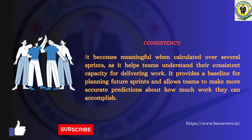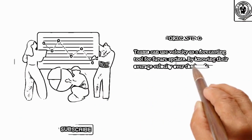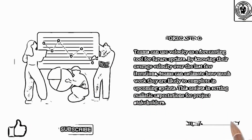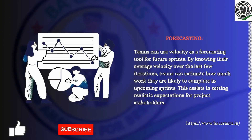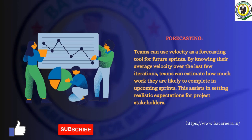Forecasting: Teams can use Velocity as a forecasting tool for future sprints. By knowing their average velocity over the last few iterations, teams can estimate how much work they are likely to complete in upcoming sprints. This assists in setting realistic expectations for project stakeholders.